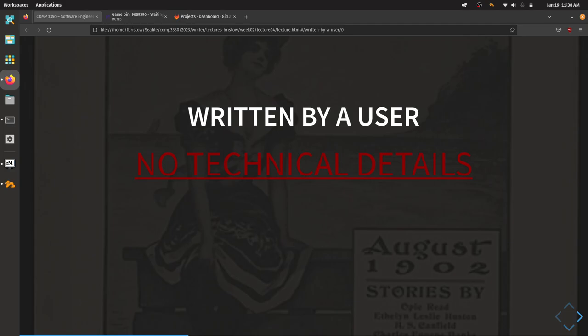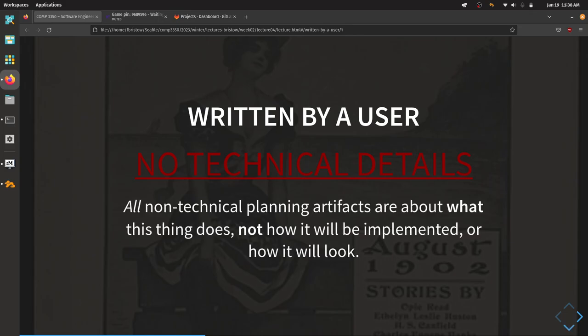User stories, just like visions and features, are written by our clients and users — so we're not going to include any technical details in this document. All of the non-technical planning artifacts we're building are explicitly about what this thing does. From vision statement down to user story, these are about what the product does — not how we as developers are going to build it, and not what it's going to look like. We can't stop thinking about that, but this is not the right place to write it down.